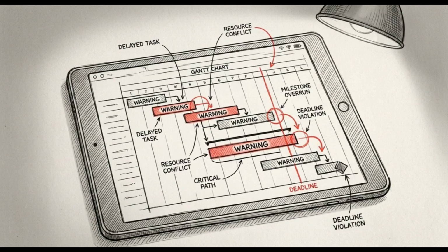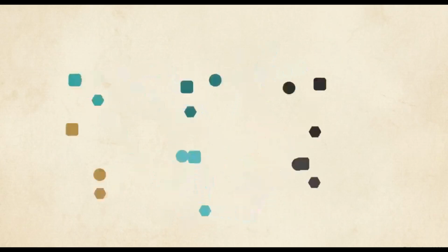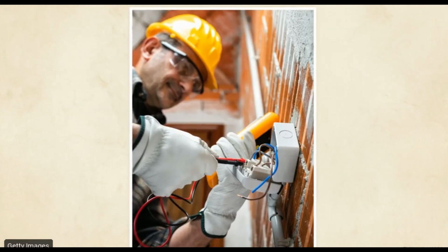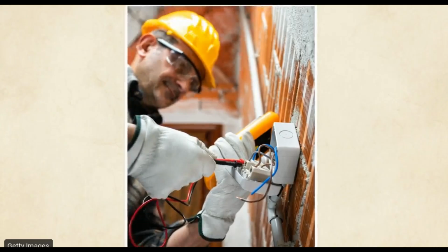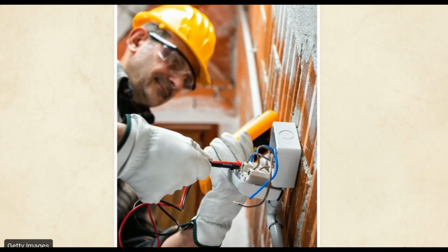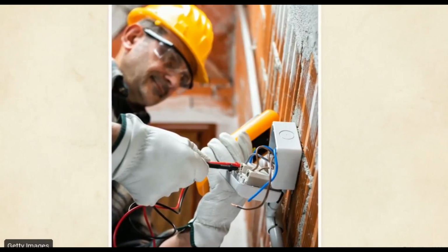Stage 1 begins before a tender is ever released. Tendering without a formal task analysis is a primary driver of project delays and budget overruns. A proper task analysis breaks a project into specific trade packages. It defines the work sequence, the project timeframe, and the exact quantum of hours required for each task. This analysis also identifies the required technical competence. An electrician working under an electrical worker certificate is not the same as a technician with a specific cabler registration.